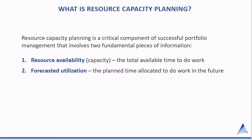The first question is, what is resource capacity planning? It's a critical component of good portfolio management that involves two fundamental pieces of information. The first is resource availability, which is our capacity — the total available time that we have to get work done. Forecasted utilization is the planned time that we have allocated or forecasted to get work done in the future. It's a forward-looking view.